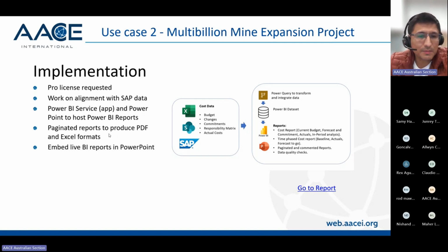We were producing paginated reports as well to produce PDF reports with formatting. That was very helpful for people that weren't familiar at all with consuming and reading data in Power BI. Yeah, that is the approach. Cost data, consuming the same data sources, but now querying the data in Power BI and producing the reports as I explained. Cost report, we were using actuals this time. We were phasing the data as well and producing cash flows, paginated reports, and we were doing data quality checks as well. Yeah, so I'm going to go to the report.